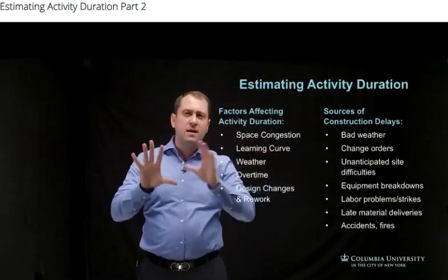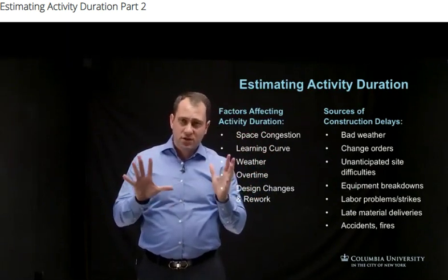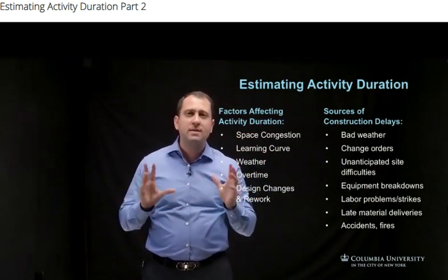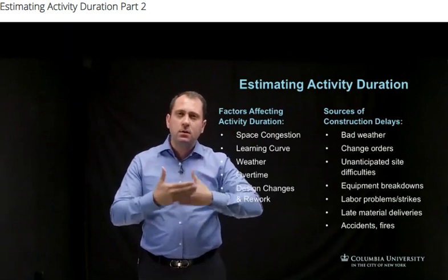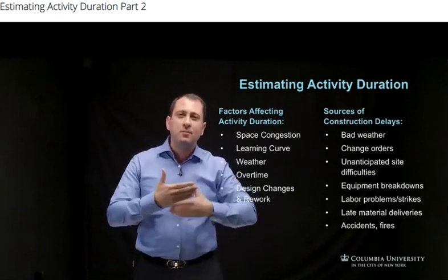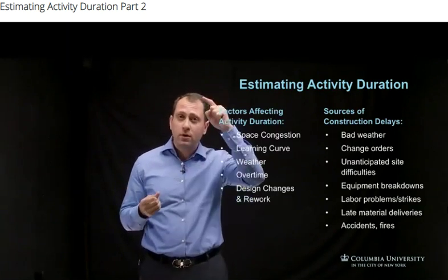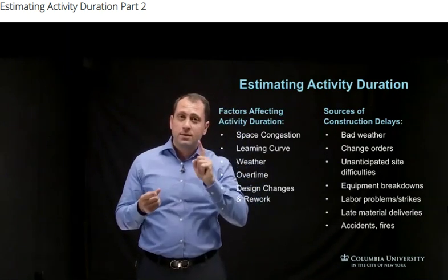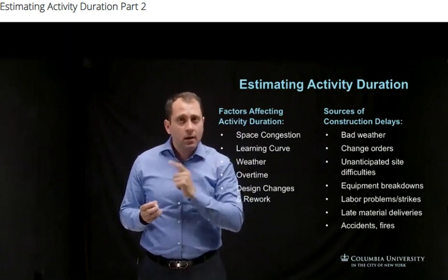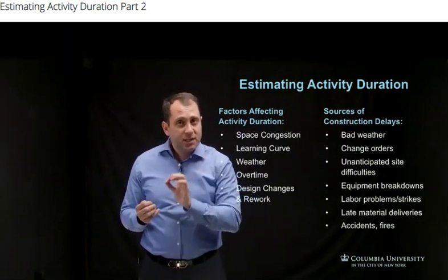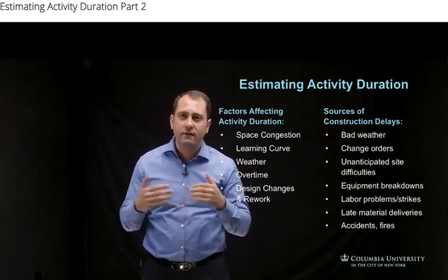Understanding the learning curve that we just drew, I want to give you a construction example. A common example is that the assembly of floors in a building might go faster at higher levels due to improved productivity, even though the transportation time to the upper floor would be longer. So that's something to consider. But again, to deal with this, historical records or subjective adjustments might be made to represent learning curve variations in average productivity.